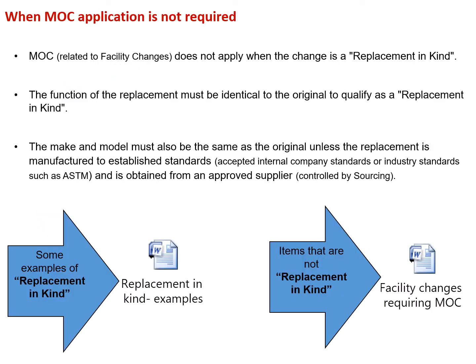MOC application is not required. MOC does not apply when the change is a replacement in kind. What do you mean by replacement in kind? Replacement in kind is nothing but if at all the same equipment is being replaced with the same specifications, that need not be documented as a MOC. Like that should be documented, but all the changes need not be recorded.